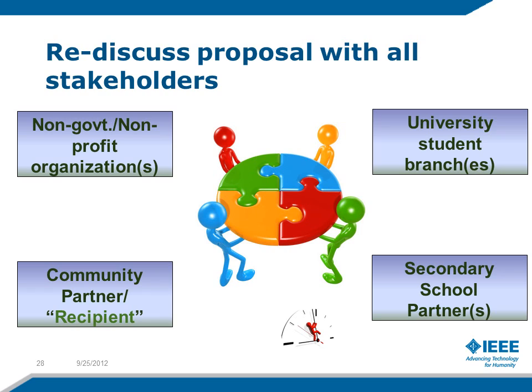Now that your proposal is drafted, send it over for comments to all involved. Specify a deadline for comments. In some cases, you may want to state that if you don't receive comments, say within a week, then everybody's happy. It's a good idea to be reasonable and keep holiday periods in mind. Volunteers may work overnight, but you may be working with an NGO or NPO staff who may be available during office hours only.